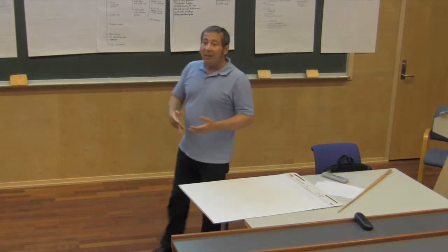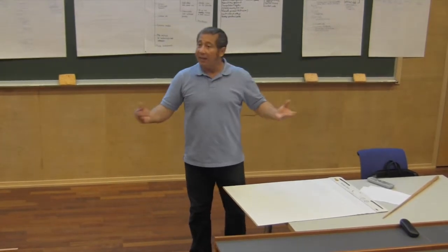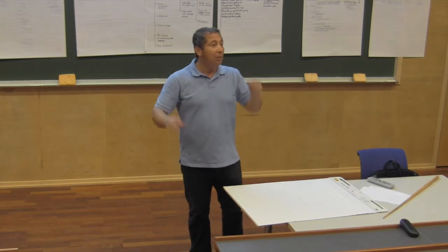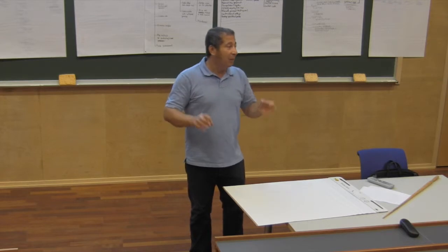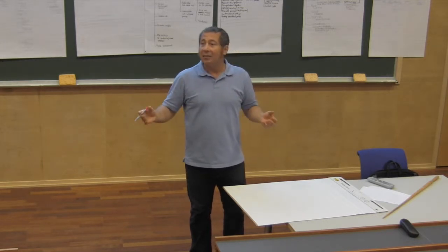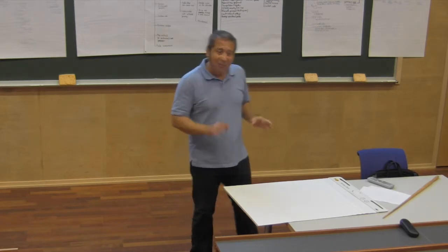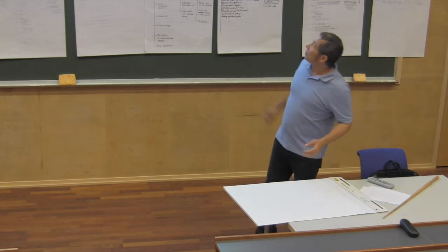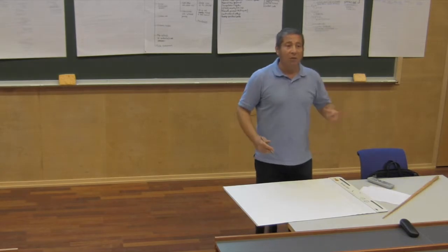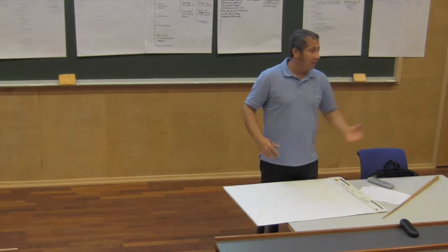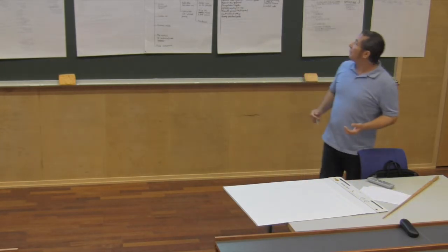And then, based on that, you develop courses, maybe like training, maybe education. Maybe some people need to learn, especially since in most of the airports there are many older people who have been there for many, many years. So going from a manual system into an electronic system can be a challenge. So let's make courses for that. And then, of course, this is a security system. We always have to have a handover protocol. And maybe other tasks that could come here.